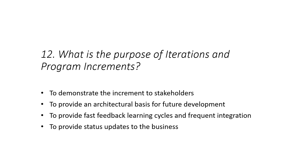What is the purpose of iterations in a Program Increment? The options are: to demonstrate the increment to stakeholders, to provide an architectural basis for future development, to provide fast feedback, learning cycles, and frequent integration, and to provide status updates to the business. The right answer is the third one — to provide fast feedback, learning cycles, and frequent integration.